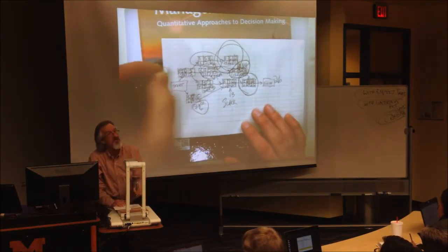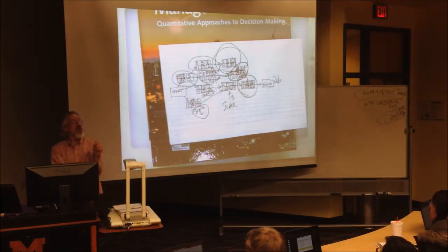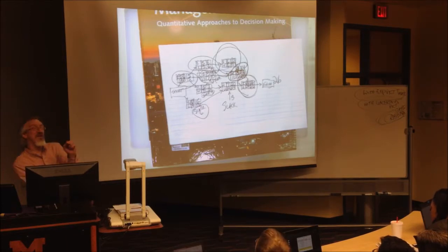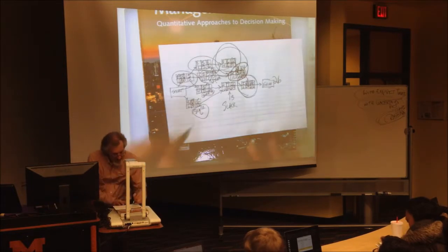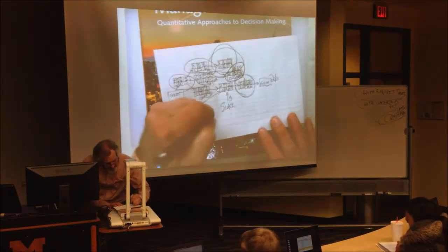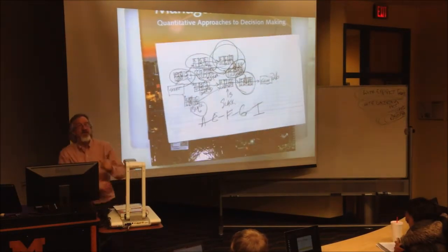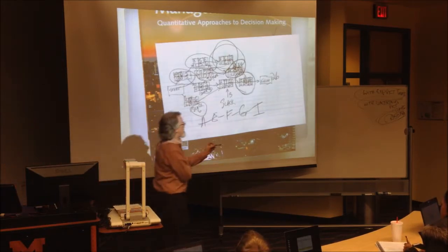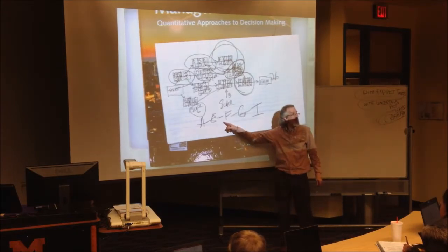Subtract 5 is 0. What kind of activity is that? Critical. We're done. Now I need you to tell me the critical path. Going from start to finish, there always will be a critical path lined up with critical activities. I heard A. E. F. G. There's your critical path.